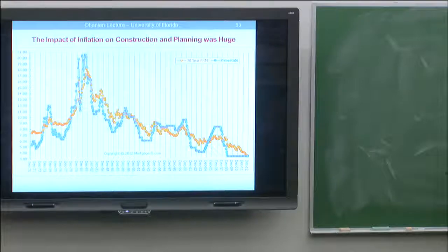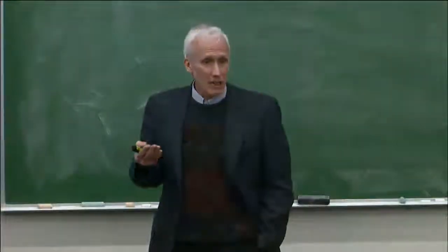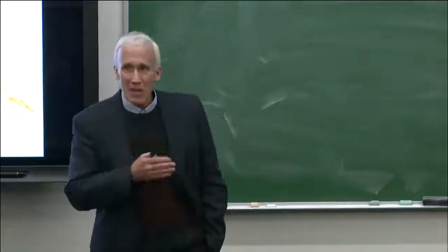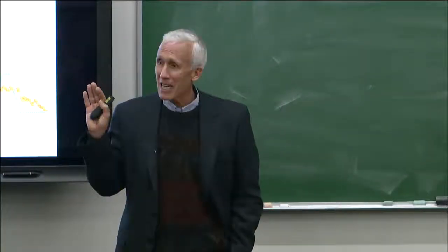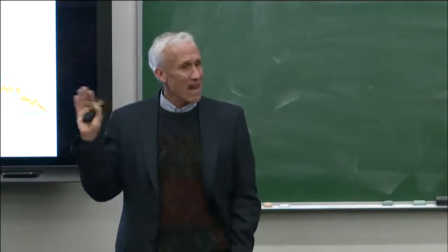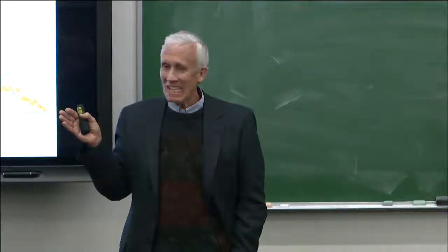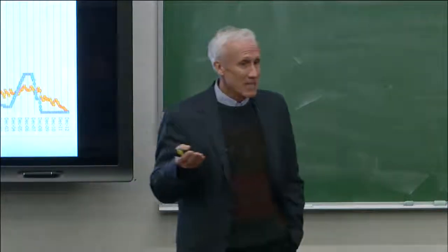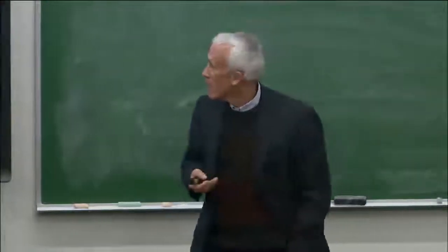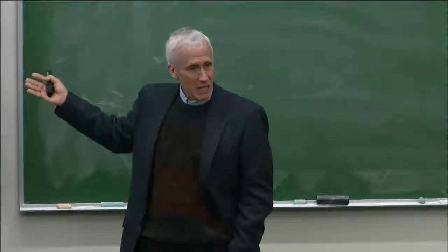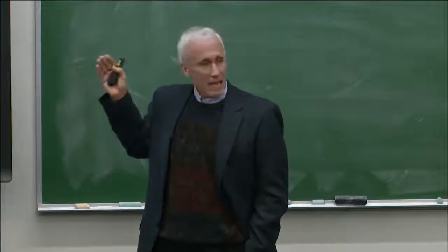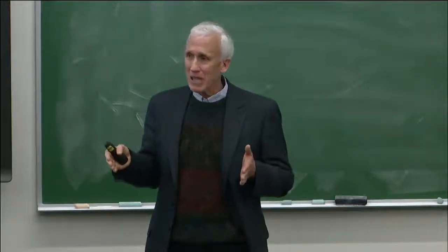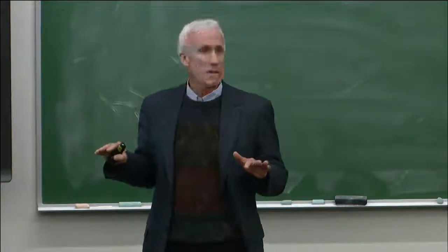All right, nuclear power, we're starting to deploy in the early 70s. When I started undergraduate nuclear engineering in 1972, there was nothing but exponential curves upward lying in front of us all. We were going to have 500 reactors in the year 1990. And we were literally building 100 of them in the 1970s. Huge numbers were being built. But when inflation hit these levels, it had a tremendous impact on a project which takes 7 or 8 years to build. That interest rate killed so many projects.